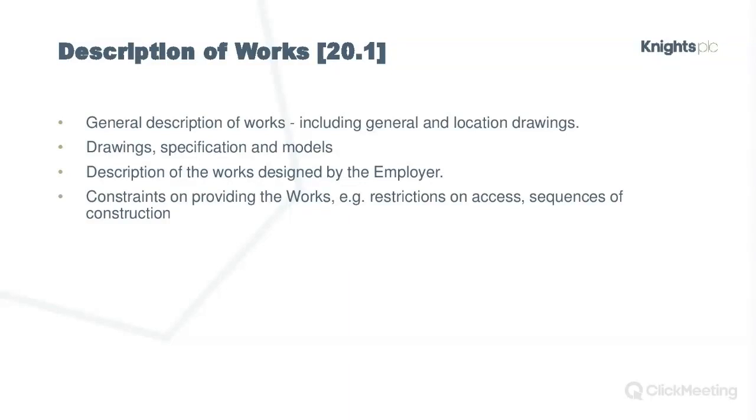And also you need to consider the pre-existing clauses, just to make sure that you don't have a pre-existing clause that says one thing, and your caveat in a Z clause says another, because again, you've then got an ambiguity.